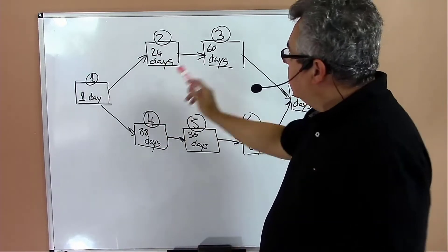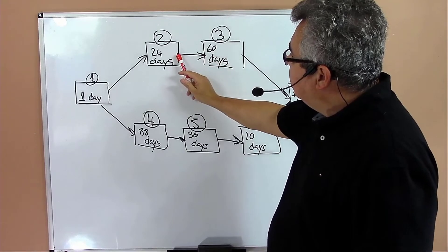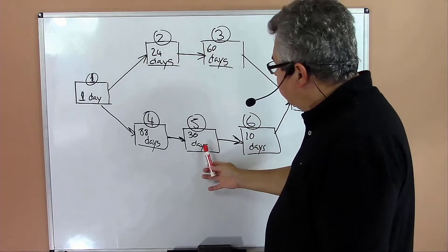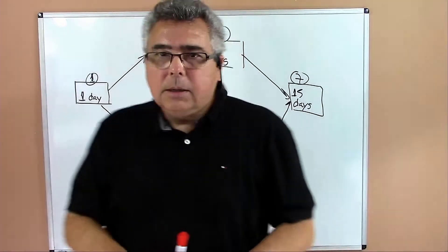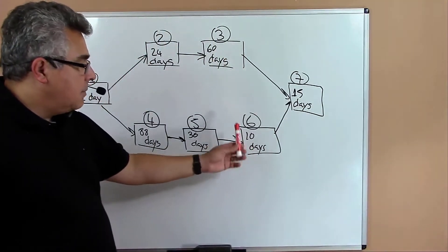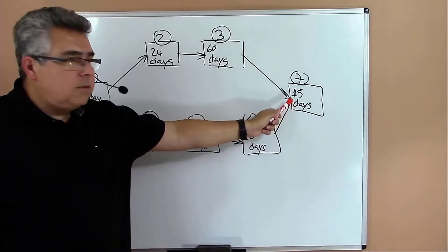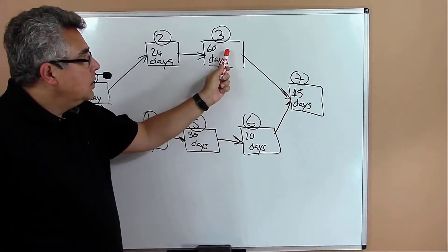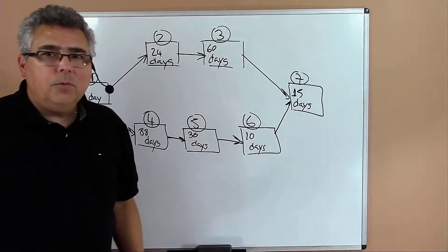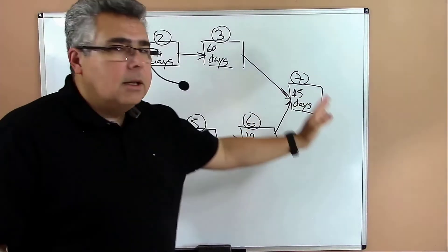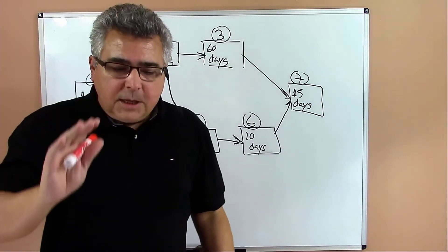Activity three can start once I finish activity two. Activity five can start once I finish activity four. Activity six can start when I finish activity five. To start activity seven, I have to finish activities three and six. Once I finish both, I can start activity seven and then complete the project.